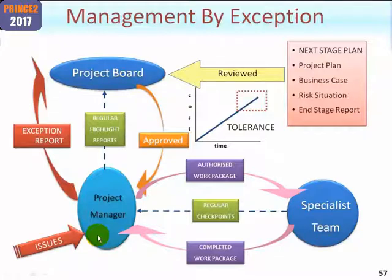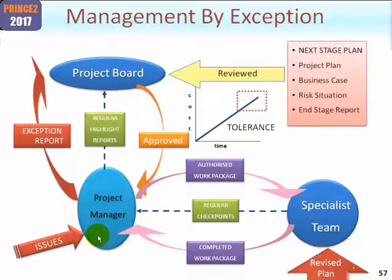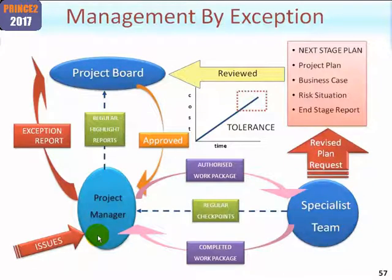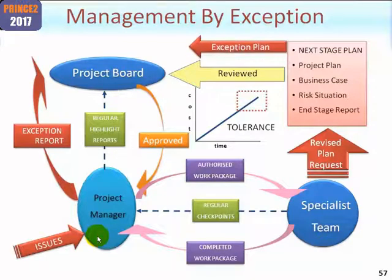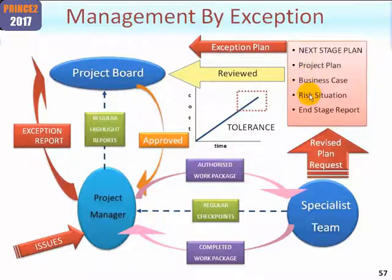The project board need to consider this and decide what to do next. They may decide to prematurely close the project, but let's assume in this case they actually like one of the options and they request a plan from the project manager. The project manager, using the process managing a stage boundary, will prepare not the next stage plan but an exception plan. However, the project manager will still update the project plan, update the business case, risk situation and so on.